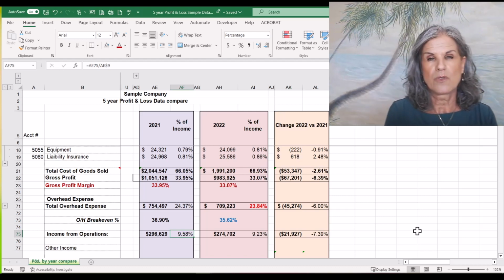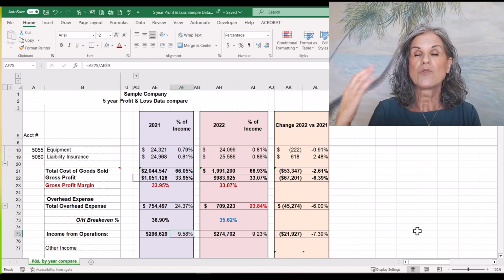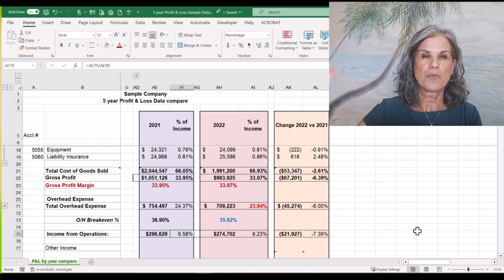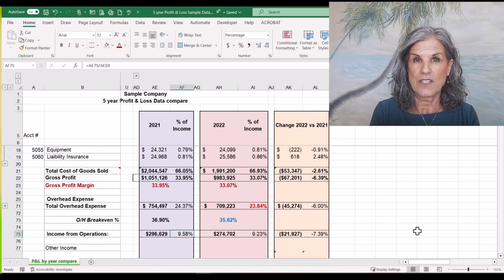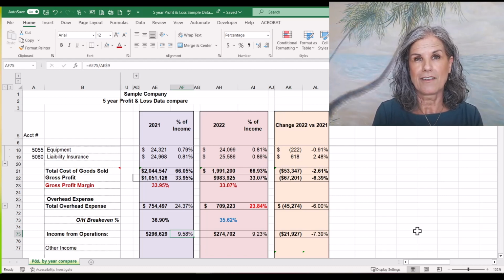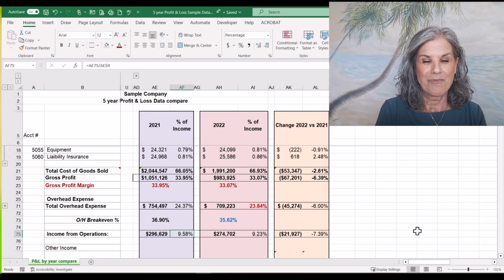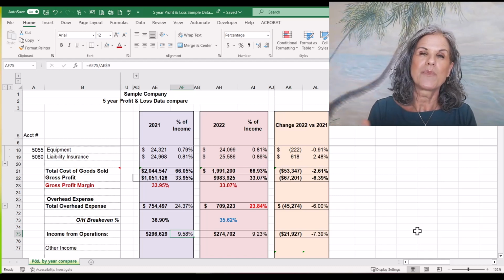Again, if you're up to about $8-10 million, that's a good benchmark to have. When you start to get bigger than that and larger projects, you have bigger dollars, the percentage tends to go down, but not dramatically. Like if you're at 2% on the bottom line, that is not a healthy net profit margin. But if you're at 6 or 7% and you're doing 15 million, that's probably fine.